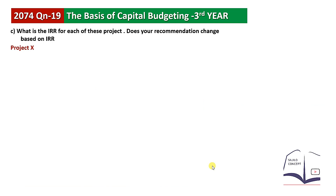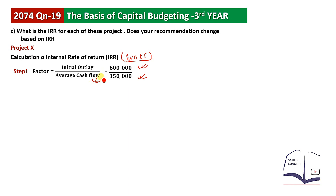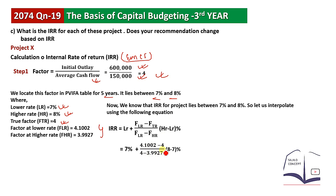Now we calculate IRR for Project X. Since cash flows are uneven, we use the average cash flow method. Initial outlay is 6,000,000. Fake factor equals initial outlay divided by average cash flow. The IRR of Project X is approximately 14.71%. We then move to Project Y.